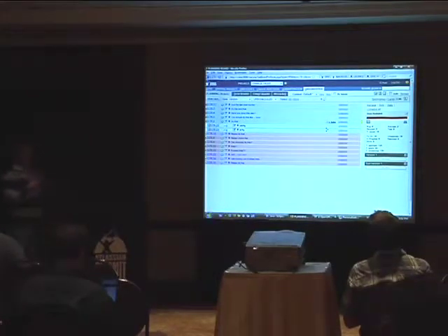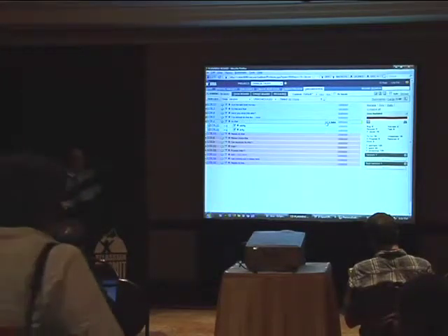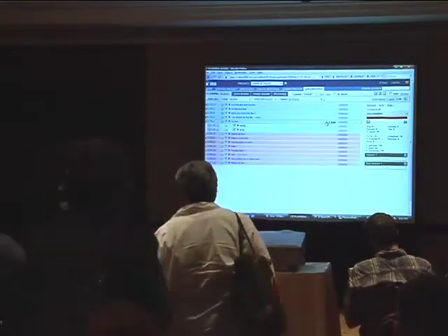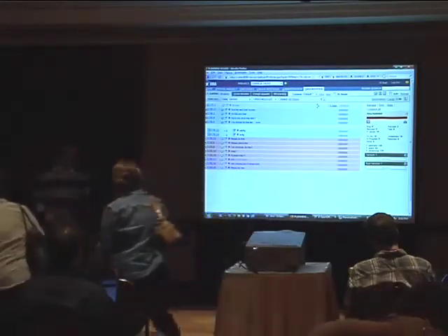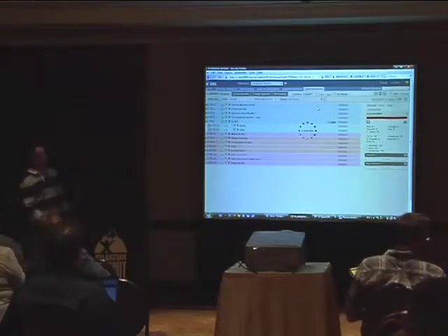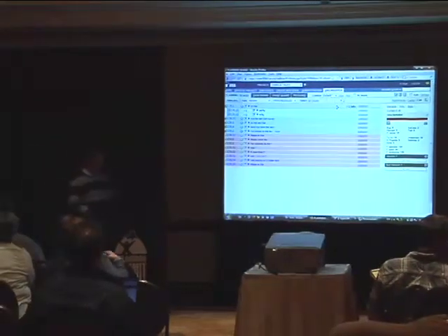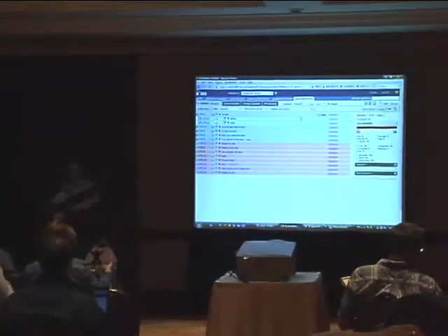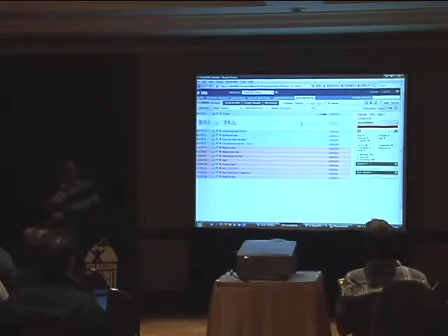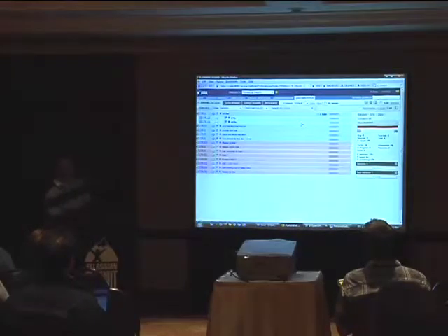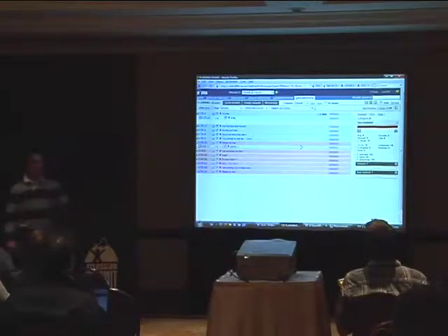GreenHopper will keep the integration between the parents and the subtasks. We'll see it as a block, so you always see your subtasks under the parent. And of course, if you reprioritize the main task, the parent task, GreenHopper will bring along the 2 subtasks. Within the parent, you can prioritize the subtasks, so I can put this one after the other one. And of course, you cannot rank the subtask outside the parent scope.